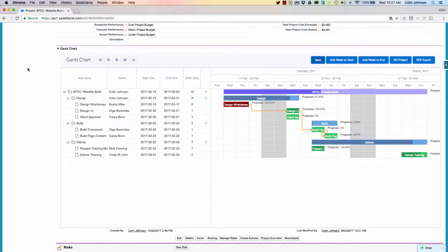So that's now been saved. Now you can see underneath my milestone, I've got three actions here. Two of them have already been fully completed, and this one is in progress. So what we're going to do is actually mark this one as complete, which will in turn trigger the design milestone to be marked as complete, which will then initiate the billing event to be created.